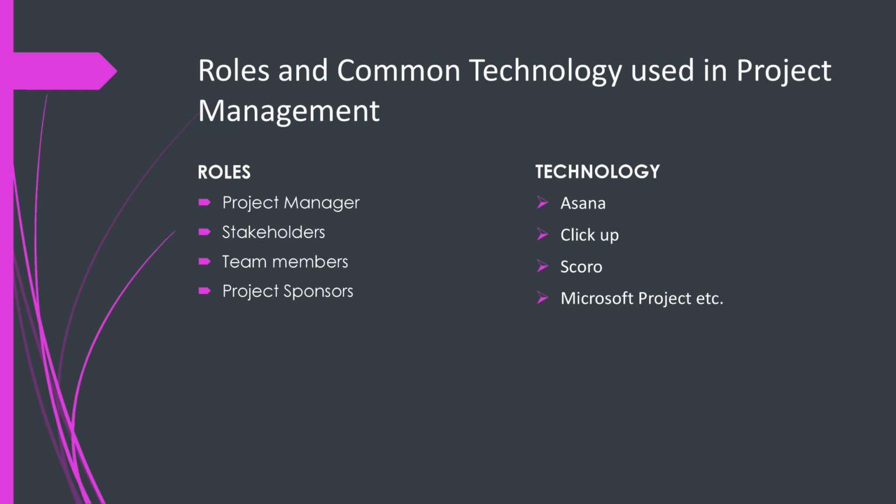So how exactly can you overcome these challenges? I listed some common issues in project management. There's scope creep, when project requirements keep expanding. As a project manager, you'll find some clients can be tricky. They can ask you to develop an app for them, telling you this is supposed to be a game. You agree on the scope of the job, and along the line they start trying to be funny. They try to expand the scope of the job while not wanting to pay for what they're expanding. That increases the time, the resources you use, and the costs, and they are leveraging that you will bear the responsibility. So how can you handle this?